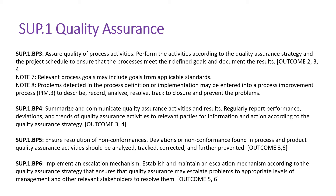BP5 talks about ensuring resolution of non-conformances — deviations or non-conformances found in process and product quality assurance activities should be analyzed, corrected, and further prevented. This covers the complete closure of findings identified during audits.